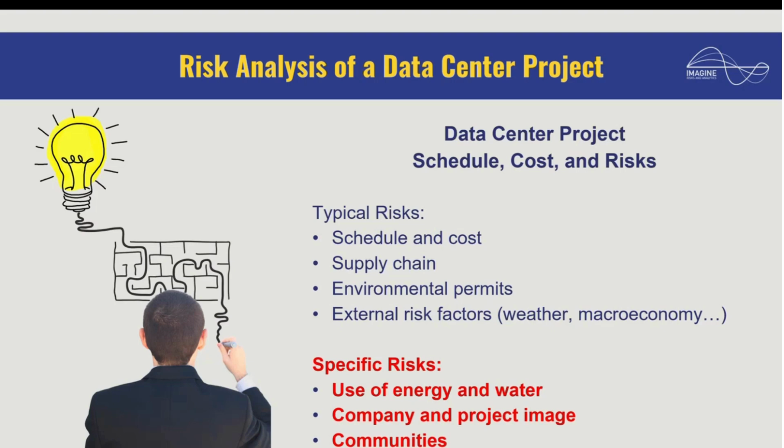The energy use is another thing, both from the technical point of view, because the project will require a ton of energy, so you need a reliable energy source, but also from the point of view of the communities, because if your project is too large for a small community, you may be increasing the cost of energy for that community. So that's a risk to your project. The engagement of the community is a risk to your project. Maybe the company image will be tarnished by the relationship with the community.